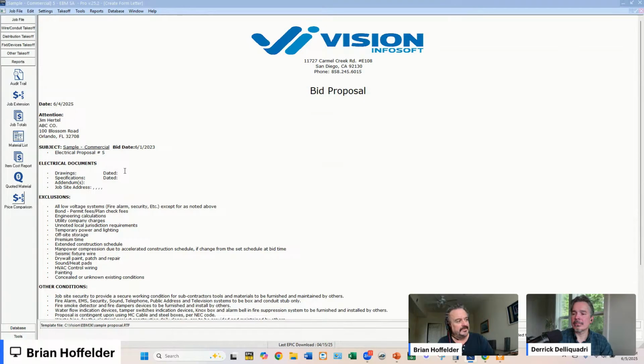Because I'm sure most of you run into situations where you submit a bid, look like you're the low bidder, and then 2 months from now, they're ready to have you sign a contract or go to work. And lo and behold, the drawings have been updated and changed. So that date becomes very critical to have. So now you can say, well, we bid the drawings at such and such date, and now you've got new drawings. We need to let you know what additional costs apply. So you can be submitting the change order even before you start on the job.